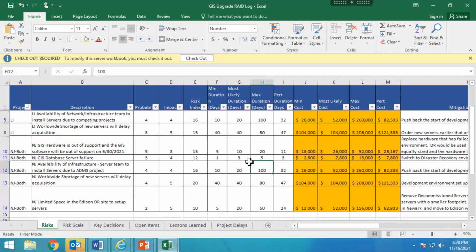So we identified those, and then we used PERT, a tool called Program Evaluation and Review Technique. And I use this not only for risk assessments, but also sometimes for planning schedules. This is a good way to determine, well, what is this task going to take? Think about your tasks. Not everyone can just give you one number, oh, it's most likely going to take this. Well, what do you think is the best case and the worst case it's going to take to do this task? So I recommend you use this more than just for risk analysis. You can also use it for your scheduling.